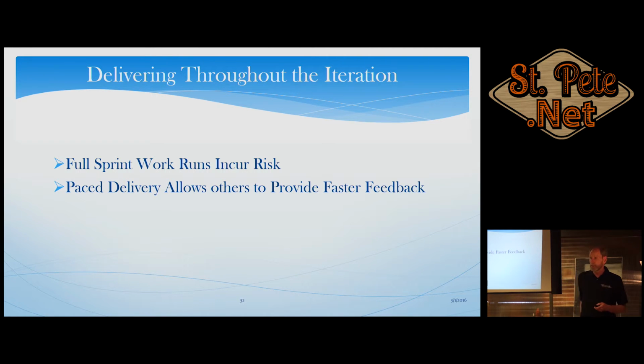Final week, user story 3. What does that do? If you still have, and most teams do to some degree, an external QA department or user acceptance testing or whatever, they can start looking at the results of user story 1 at the end of the first week. They're not waiting for the last 2 or 3 days to look at the code. Delivering value throughout the sprint, end of the sprint is better than months at a time, but end of the sprint is really not ideal. It's high risk, and it does not promote good flow.